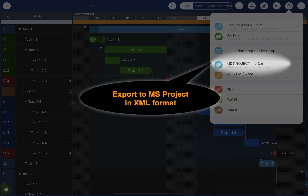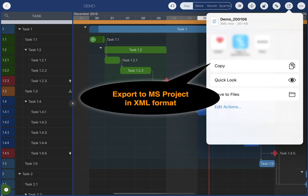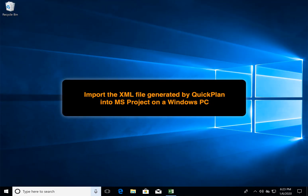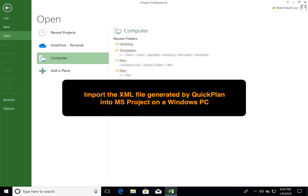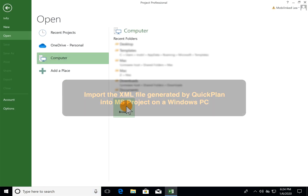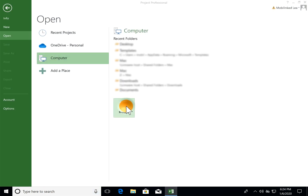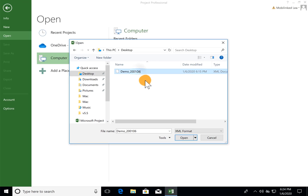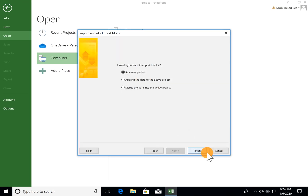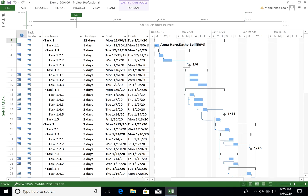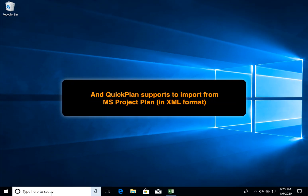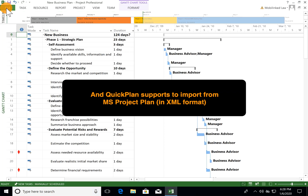Export the project to an XML file. On a Windows PC, we can import the XML file into Microsoft Project. QuickPlan also supports importing from an XML file generated using Microsoft Project.